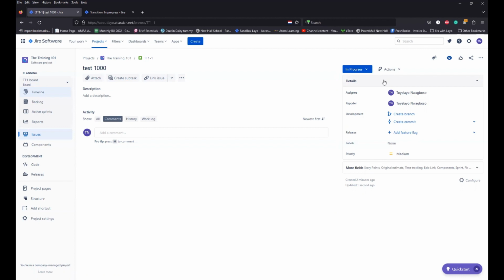Anything that is a data quality issue for your team, a must field or a field that needs to be populated but always isn't, it's always important to put validators on, so you're fostering the behaviors of the team to make sure they do certain things without skipping. And then you don't have to go back and chase people to say, oh, this is not done. Why is this not done? It's just a way of forcing people to do things based on rules that you set in place for the team. So I think that covers it for today's session.